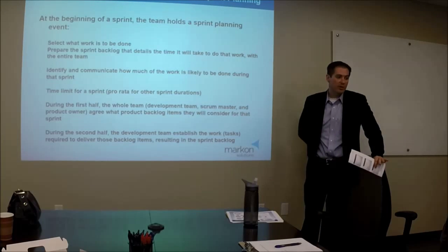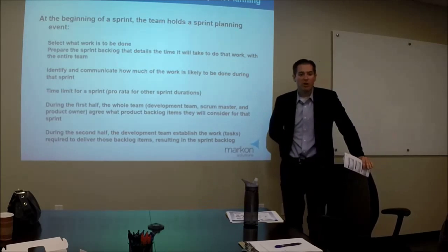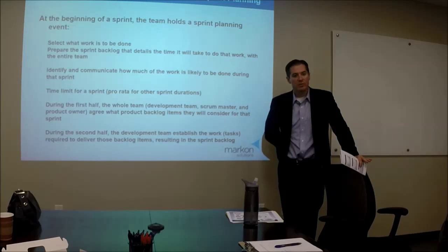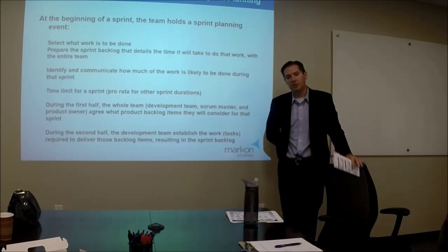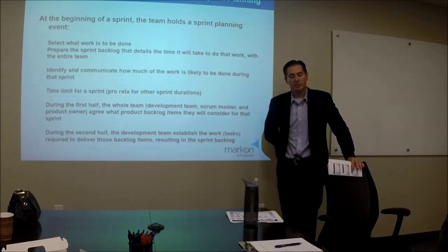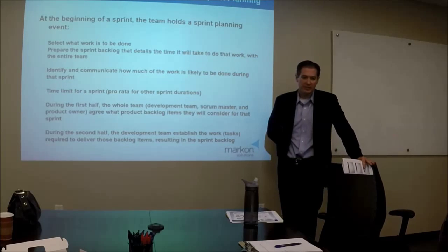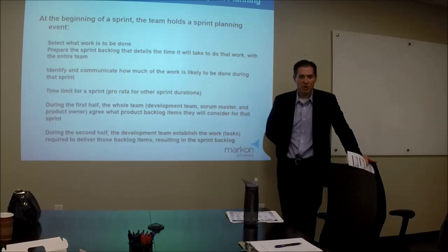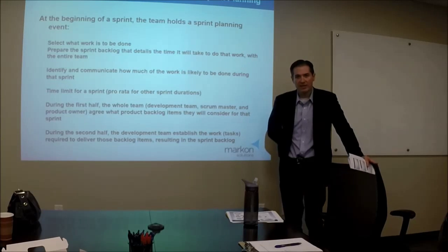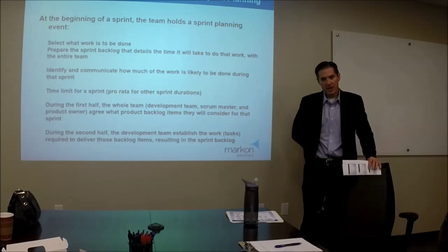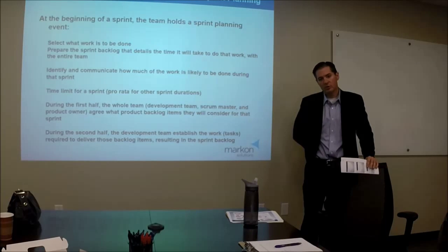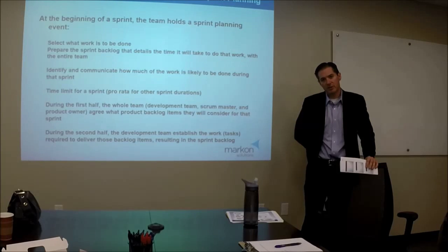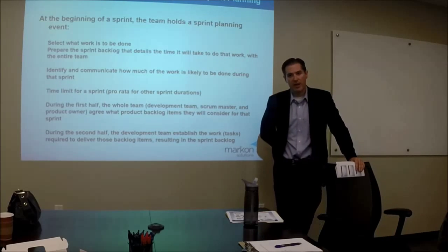It's definitely true that not everything just gets done in 4 weeks in the real world. If something takes longer than your sprint duration, instead of a user story, they call that a user epic. These are pretty advanced practices, but some teams have sprints of sprints, or planning for planning. Pretty advanced teams doing tons of stuff will do further visioning. We did something similar, we called it a meta sprint.